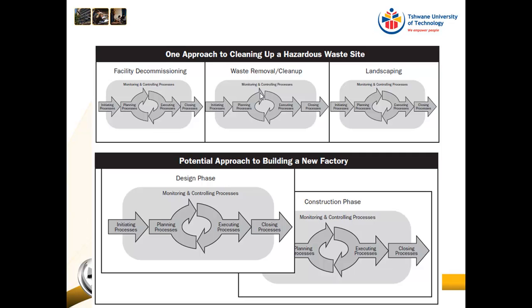Okay, and then the last thing to realize is that one of the things that we can do to make a project go faster is we can fast track it. Fast tracking basically means that we do phases in parallel. So here we are building a new factory. So what we do is we say, okay, as soon as we have done the design of the